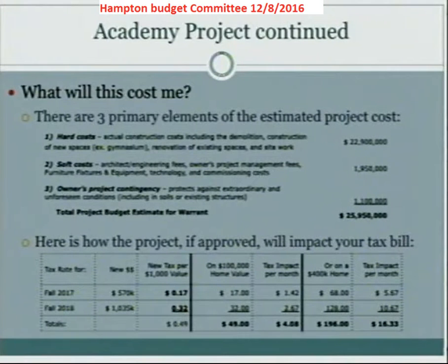In any project like this, you have an allowance for and an anticipation of FF&E, how much money in the project is going to support new tables and desks and chairs and new equipment that might be installed, like technology equipment and the like. We've made a commitment to try to keep 75% of our FF&E in place and make 25% investment with the project in new. The further commitment will be that we work ourselves into an inventory turn where we start to see that other 75% replaced over a reasonable period of time.